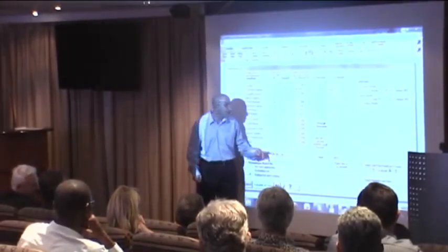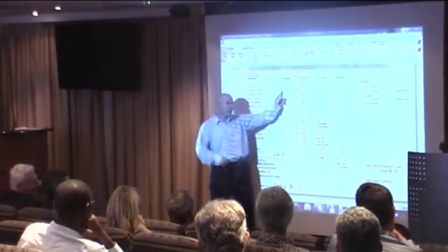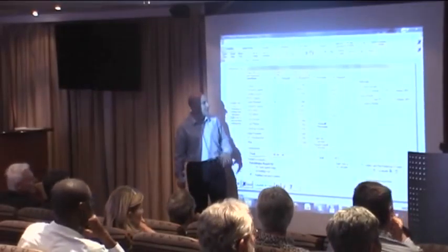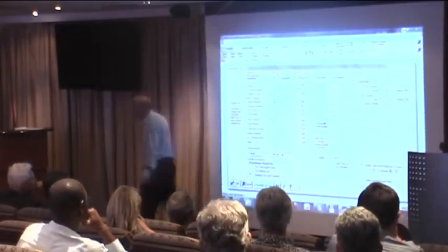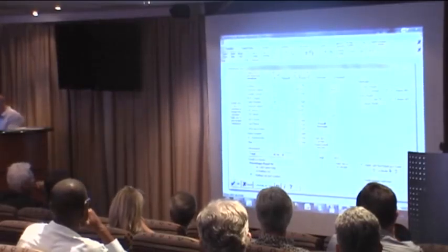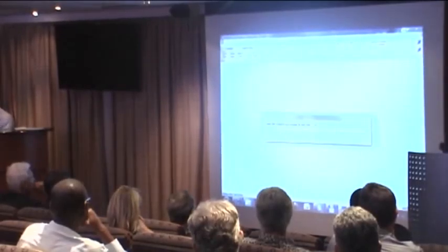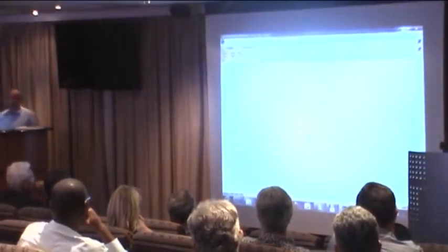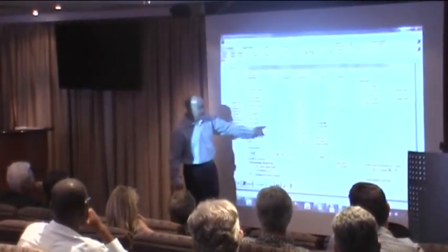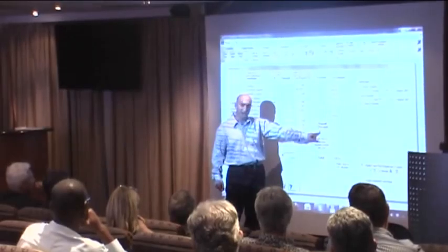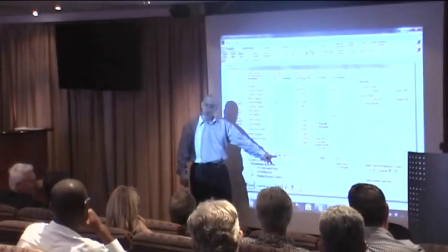So all we're going to do is say, I want a total package of 12.5, go back, adjust the gazetted tariffs, and determine what the discount needs to be to achieve that. And that's quite a complex calculation. So it says, what percentage do we want? 12.5%. Click OK, and even at that rate, you're lucky to see 12.5%. Be that as it may, it comes back, calculates and says 38.04% is what you need to be discounting to achieve your 12.5%.